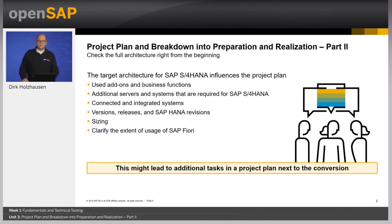Test relevant critical interfaces as early as possible. It is recommended to check if there are dependencies with regard to the release versions of connected systems. It must be ensured that the connected environments are released for S4HANA — check that every version is fitting to each other. Also check the so-called Netweaver Hub systems such as BW and Enterprise Portal for their interoperability with S4HANA. An upgrade of these systems might be required as well.